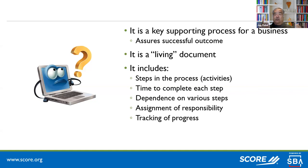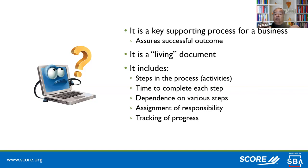Dependencies on various steps — you can't go to the next step until the previous step is completed. Back to my trip example: the hotel room was dependent on my flight, not the other way around. And the same with starting a business and filing with the State Department — that's a dependency before you can go forward. A lot of times we forget about dependencies or don't recognize them until we get to that point. That's where the project plan comes in very handy.